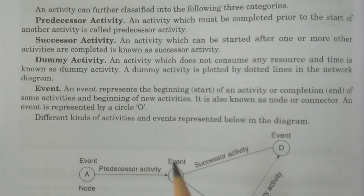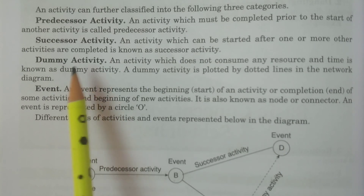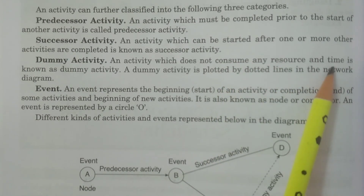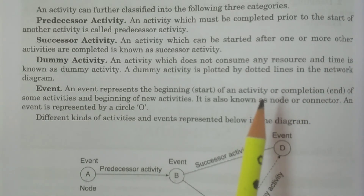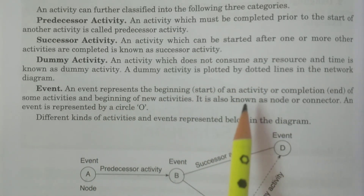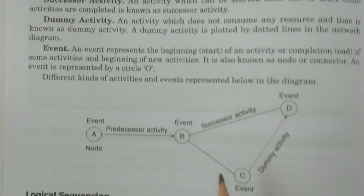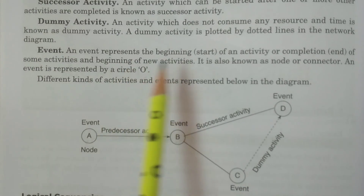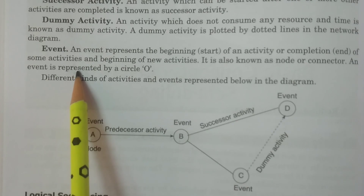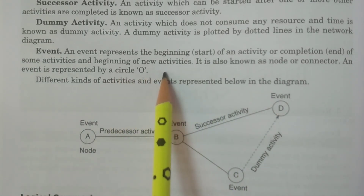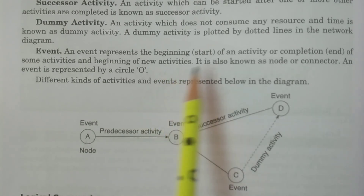A dummy activity does not consume time or resources. It is introduced for a few specific purposes and is plotted by dotted lines. An event represents the beginning or completion of an activity. It is also known as a node or connector.